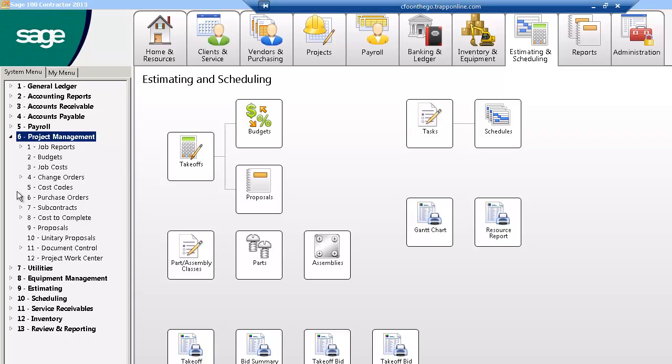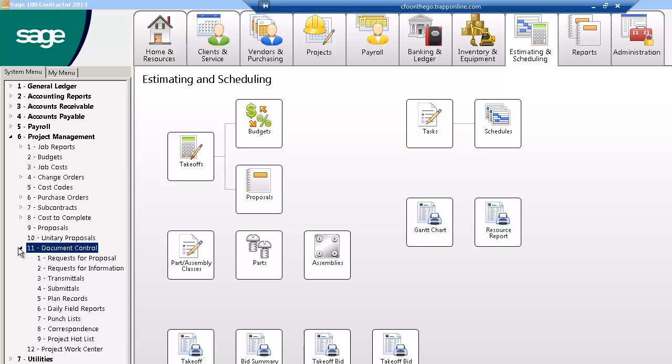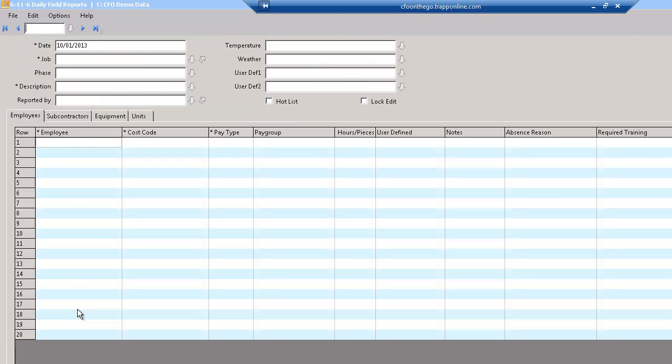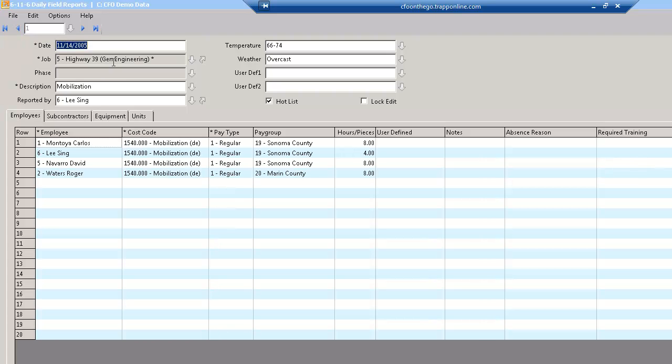I'm just going to go down a list. Obviously we can get online with your client and yourself, and we can go diving deeper into some of this stuff. But daily field reports are one of my other favorite items in here. On a daily basis, what day did I work? Simple stuff here. We're not asking them to have a master's or a PhD in this stuff. What did I do? Who am I? What was the temperature range today? What was the weather like today? Sometimes I may need that for a claim.